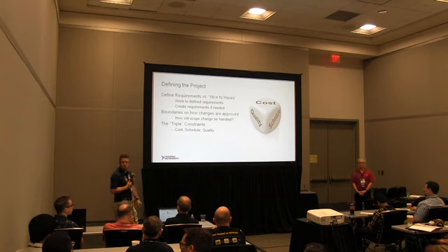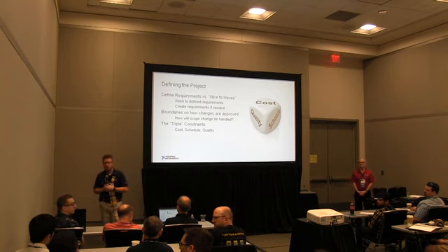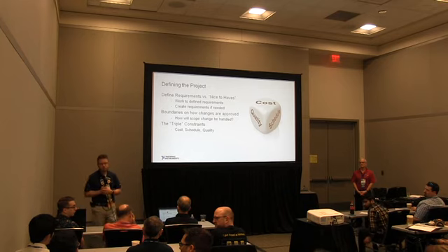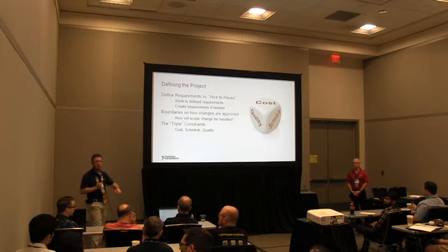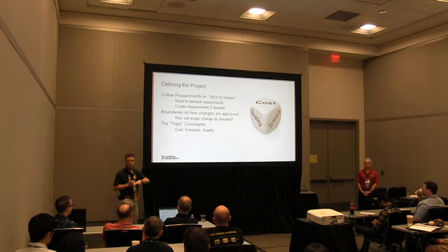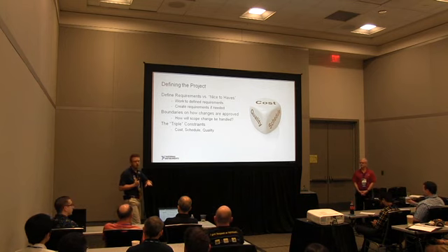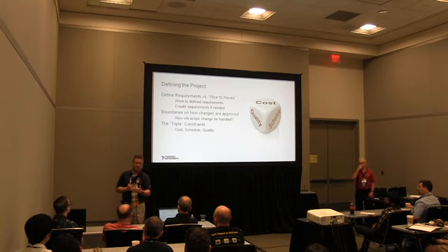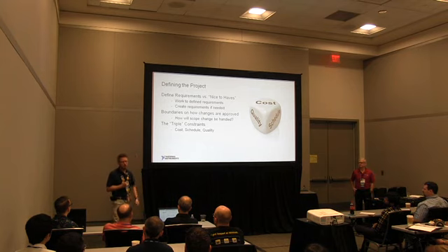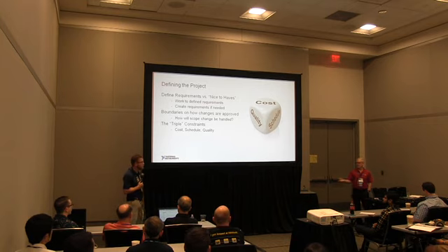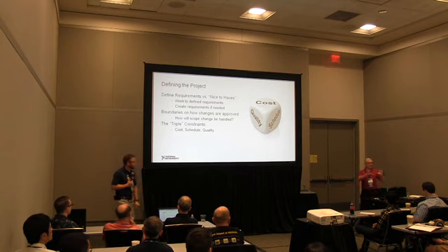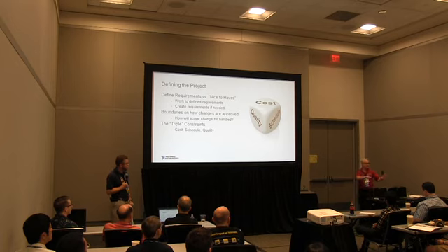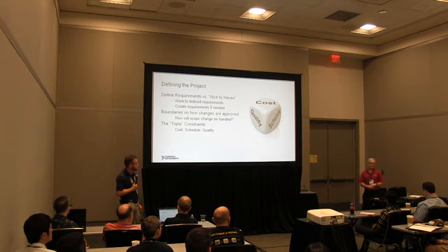Got a question. Not necessarily are the nice-to-haves easy to implement. Sometimes the nice-to-haves may be quite difficult to implement. Right. So the comment was that nice-to-haves aren't always easy. Sometimes they're quite difficult. And again, that's really where you have that discussion. If you can prove the value of that nice-to-have, a lot of customers will be like, yeah, that makes a lot of sense. We need to do that. So yeah, that's a good comment. And it's appropriate to push back and say, I definitely want to, I can implement that, but I need to have the scope change. I need to have written authorization to implement that. Definitely.